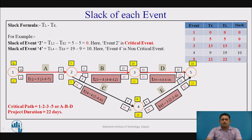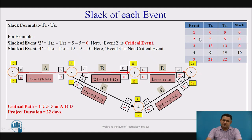The overall network diagram shows the red color arrows representing the forward path, with the project duration being 22 days. The table represents events and their slacks — red color events are critical ones and black color events are non-critical ones.